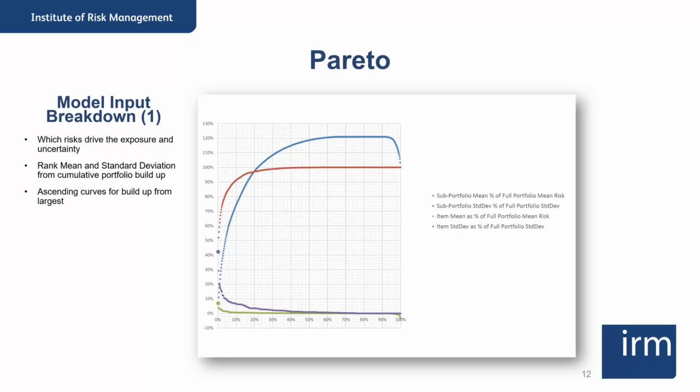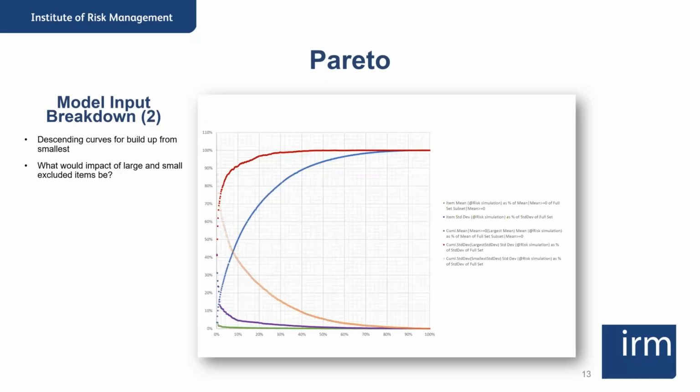It lets them know which risks not to worry about and not to dwell too much on the quantification. Echoing Doug's point there, you can spend your time where it matters. But also, it shows you where some of the gaps might be. I'll leave you to look at this, but the descending curve shows that sometimes it's the biggest risk that makes a substantial difference on the uncertainty. And if we've made exclusions of major risks, you can very quickly see the gap between your QCRA and the reference class forecast, and where that might come from.